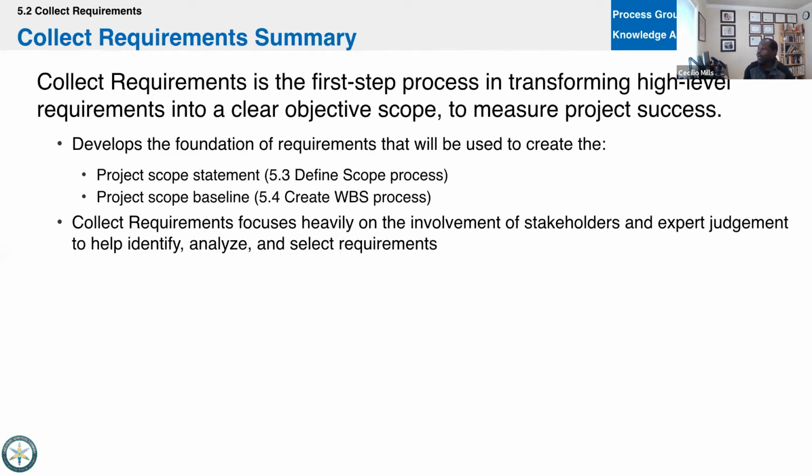We're going to get to another spot, and I'm going to mention it now. When we get to scheduling, and we start sequencing activities, and we start thinking about dependencies, internal, external dependencies, and then soft dependencies and hard dependencies, the exam tries to make things like government regulations seem like a hard dependency because it's mandatory where you're operating, but it's not, right? They're external dependencies. I just want to mention that there because there are some parallels.